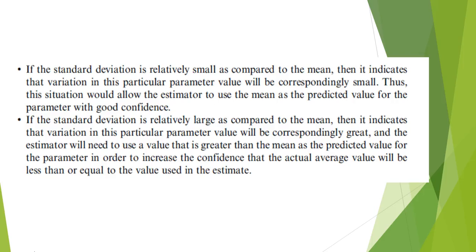And I could run simulations using the triangular function, or I could run simulations using the normal function and see which gave me the most reasonable numbers, or numbers, again using other statistical parameters, which gave me the most security that that number would be a good estimate to use for my final answer. So you can use both. You can use others to fit.